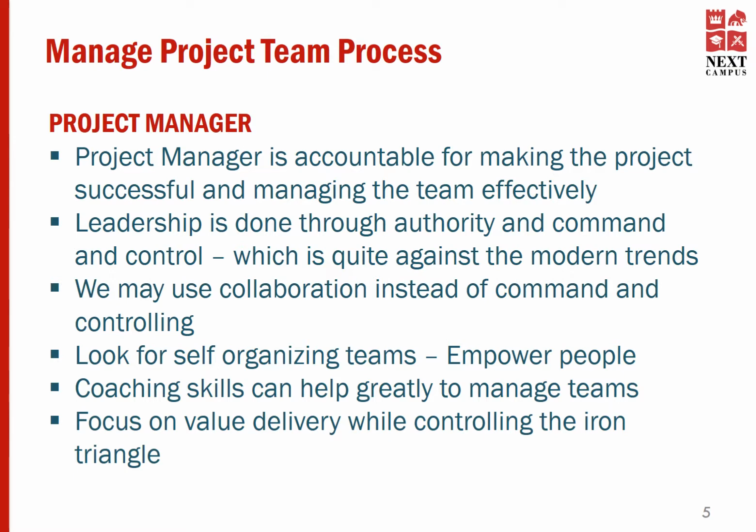Penalty or coercive power is the ability to penalize team members. For example, team members overdue in their task will not attend the company party. So you are penalizing the overdue resources by not letting them attend the company party. And this is an example of penalty power of project managers.